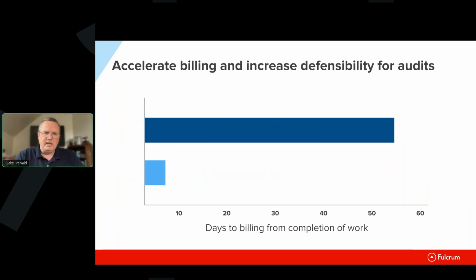One of the really key things that this does is accelerate billing, because now you're not trying to bill by having a person in the back pulling information from multiple different systems to give proof of work. You're pulling from one system, the field platform, and it's giving you the evidence that you need. It's giving you the process that you went through. It's giving you the photos that you took that are evidence of what you did. It will give you any exceptions that you had to deal with, any kind of as-built style data capture that says, okay, I was supposed to put it here, but I had to move it 5 feet to the right because there was a big boulder. There's all of that in one place.